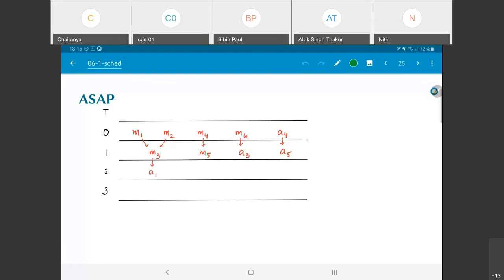After that, I have A1. Even though M5 has completed, A2 cannot execute because it depends on both A1 and M5. Finally, in time step 3, A2 is now ready to execute because both M5 and A1 — its dependencies — have been satisfied. This essentially constitutes what we would call the as-soon-as-possible schedule.